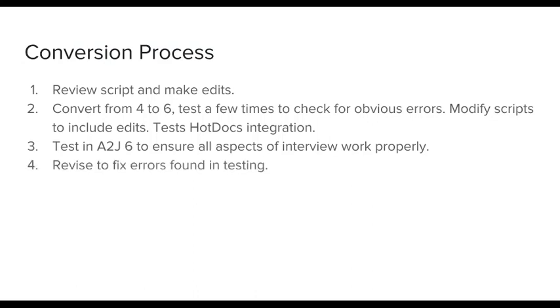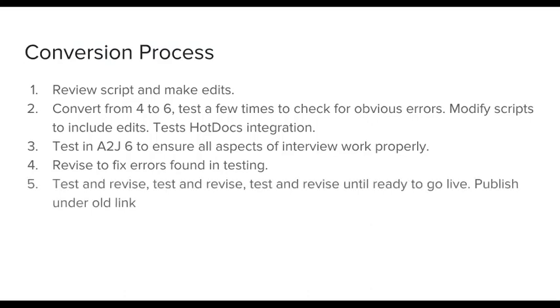Then you're going to work with your developer to revise the interview to fix any errors you found in testing. And then we go back and forth between steps three and four many times, test and revise until you're ready to go live. And then you can upload the new A2J 6 interview. If you want to keep that same link for stats purposes and so you don't have to go change every link everywhere you have it posted on your website, which I really recommend, just upload the new interview files under the old link so that the transition is seamless from the user's end.